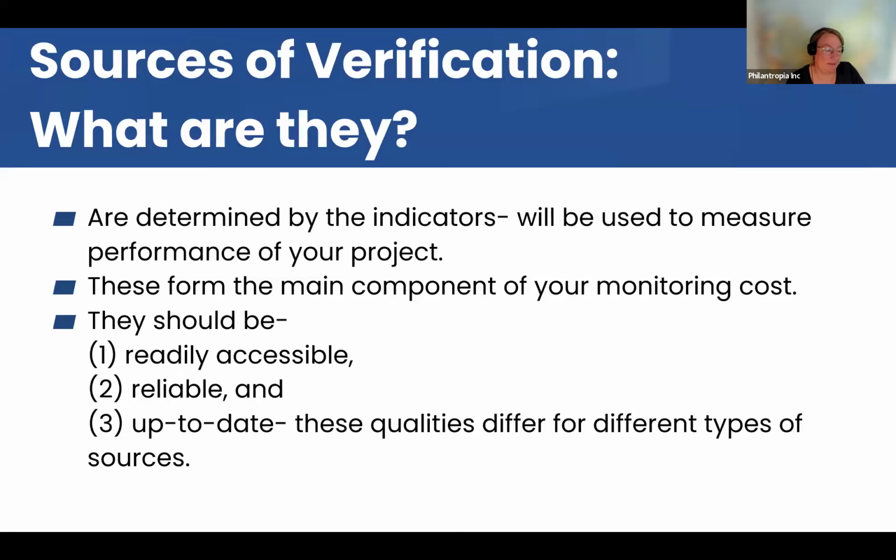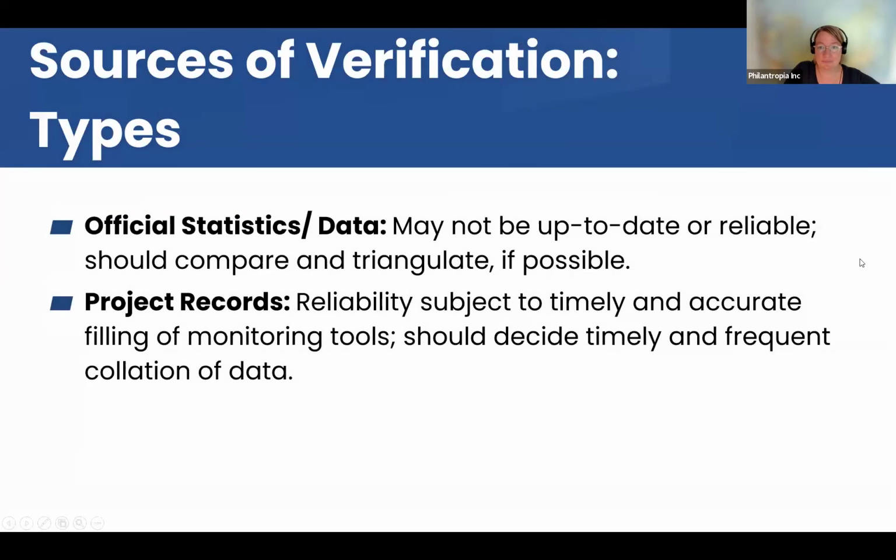For example, if you use census data and your project runs for 3 years, there's not going to be a census every 3 years, stuff like that. Or if you have some budget to do a preliminary study, but not the same budget to actually do another study at the end of your project, it's going to be difficult for you to report on some indicators. So you have to think of those things in advance to be prepared and to know what's coming.